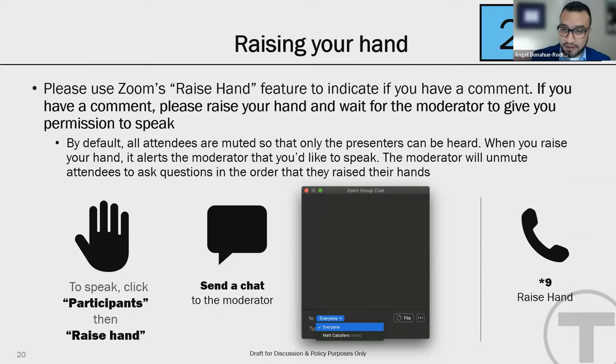Thanks, Alistair. I'm going to do a quick comment that we had. We have a question in the chat, written by Abby Swain, Heinz Convention Center Station: This is an important project for all mobility impaired of the Green Line. Does this CIP spend take the project to completion? So we just want to let you know that there's $45.7 million for design and construction, and that's included in the CIP.